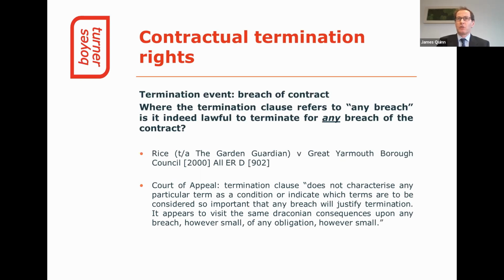The council appealed to the Court of Appeal. It argued that the termination clause should be applied literally to give them the right to terminate for the breach of any of the obligations in the contract except for trivial breaches. The Court of Appeal rejected this argument.